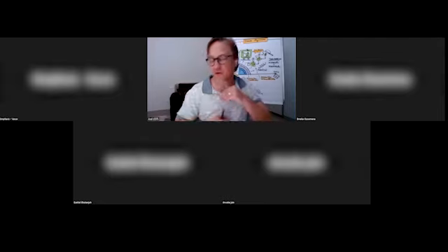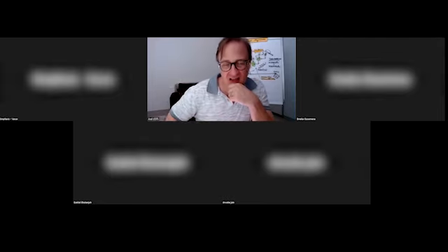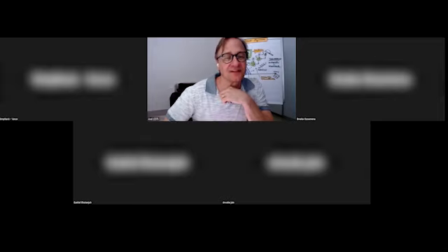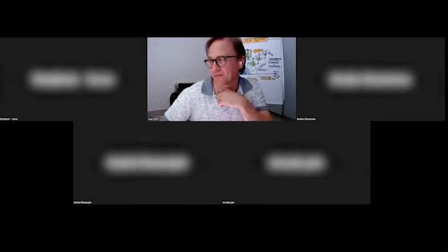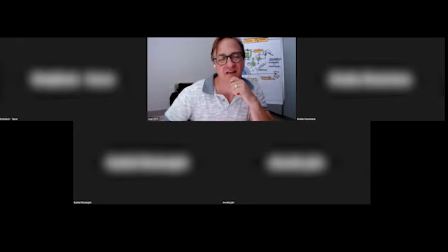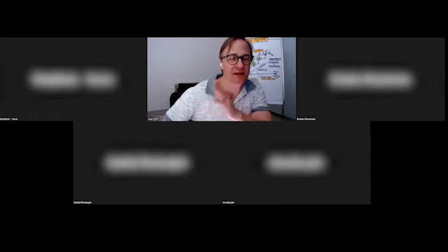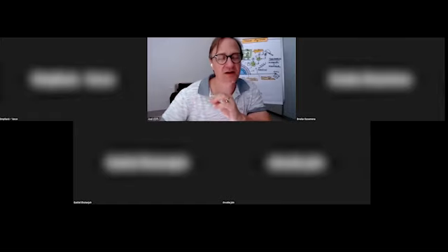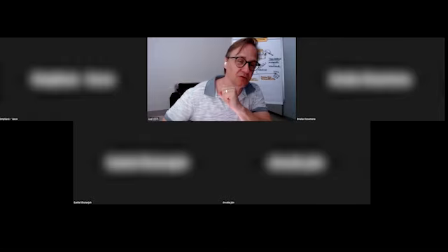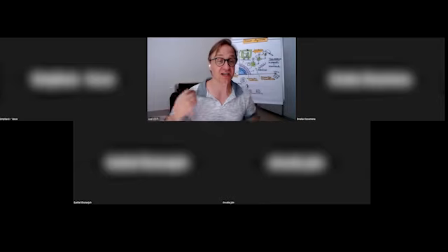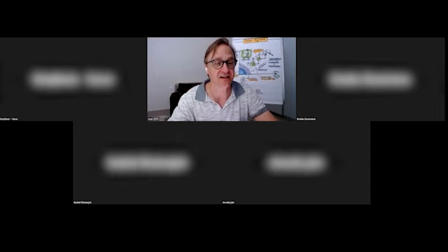But one of the most important parts of agile thinking is that we want to be able to change. So if we deliver the very first credit card, and then we say, yes, but something more important has come up, that's okay. Now the client can pay and it's good enough. Let's focus on something more important. And this is the mechanism that allows the product owner to change priority all the time, to always focus on the next most important thing.